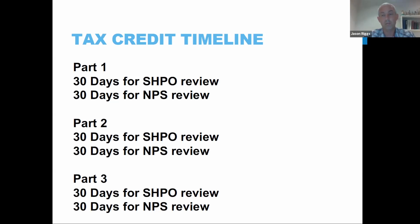And at that point, you have to go back to the drawing board and basically redo the whole part 2 and then resubmit it. The part 3 is the same review period, 30 days at SHPO and 30 days at NPS. And then you get your response for your part 3, your completed work. Again, these timelines are for the combination state and federal projects. If it's one or the other, the review period is less.